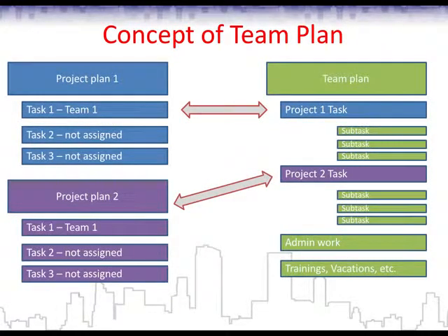He should have the authority, again, either to accept this, or maybe reject it and try to push the team lead to get back on track, or maybe the project manager can postpone his plan by 3 weeks, for example, if you want to add some contingency buffer, if he sees additional risks with this task. So the owner of the plan should be fully responsible for his plan, and it should be connected with other plans, but it shouldn't be automatically updated.